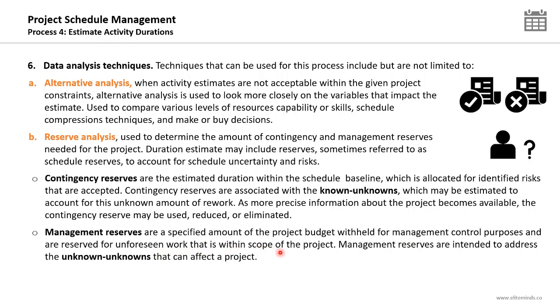Some risks cannot be identified earlier, they will just occur. So how to deal with those risks which we did not identify earlier? By using the management reserves. So management reserves are made to deal with the unknown unknowns, risks that we are not aware of.